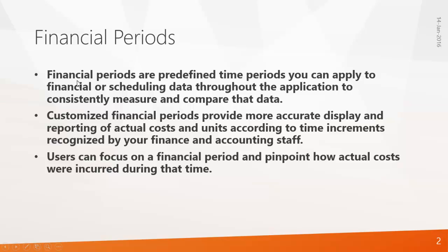So what is a financial period? Financial periods are predefined time periods you can apply to financial or scheduling data throughout the application to consistently measure and compare that data. Customized financial periods provide more accurate display and reporting of actual cost and units according to the time increments recognized by your finance and accounting staff. Users can focus on a financial period and pinpoint how actual costs were incurred during that particular time.